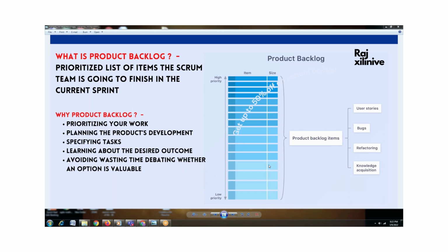Now, product backlog refinement happens every time. For example, there were 10 user stories in this backlog. Now the top 4 we have taken in the first sprint. How many do you have left? 6 user stories. Let us say these 4 user stories are being developed. Now the customer asks you to add a new user story, or wants to edit an existing one. So what do we normally do? As a Scrum Master, we don't make any changes in the existing sprint once the sprint has started. Remember, underline this point: in Scrum, as long as the sprint is not started, you can make as many changes as you want.